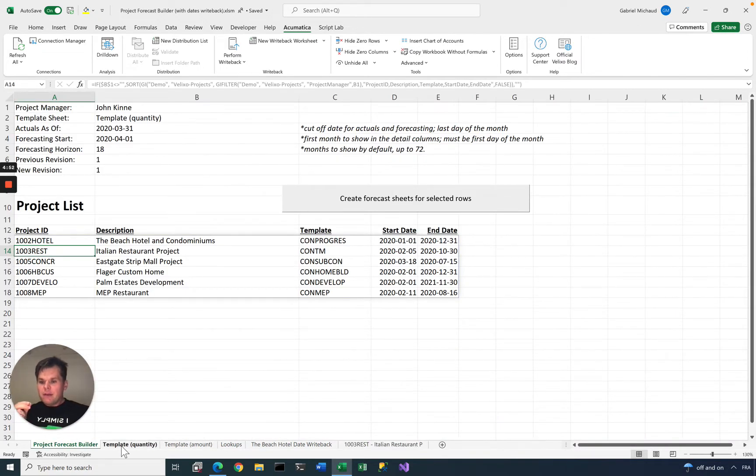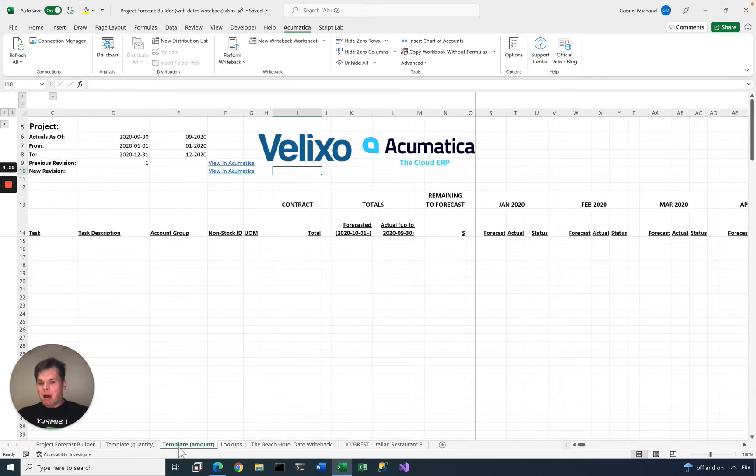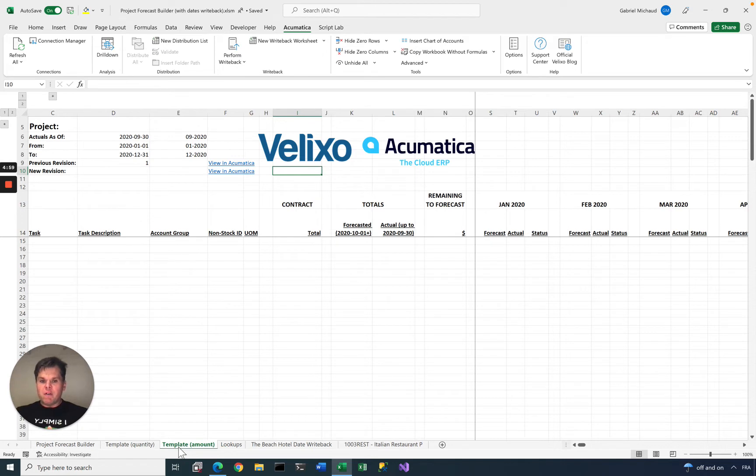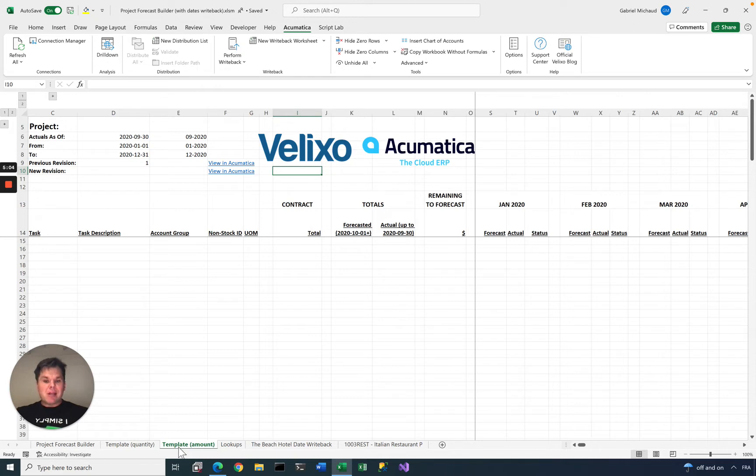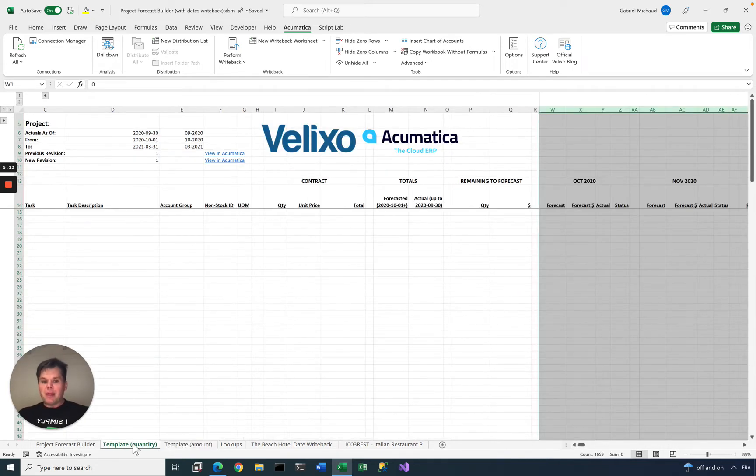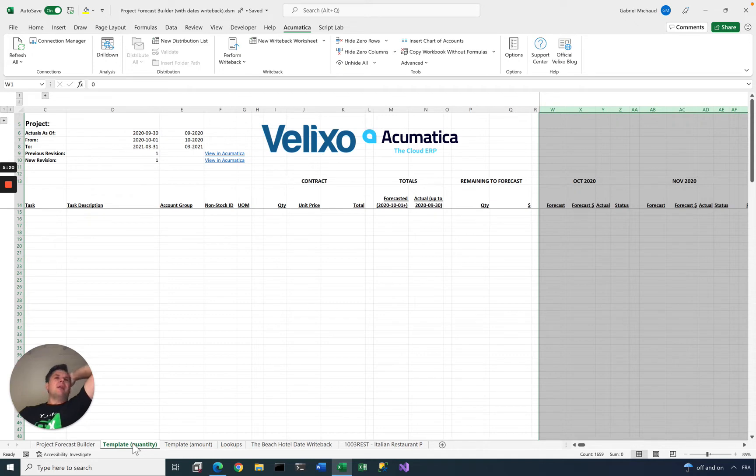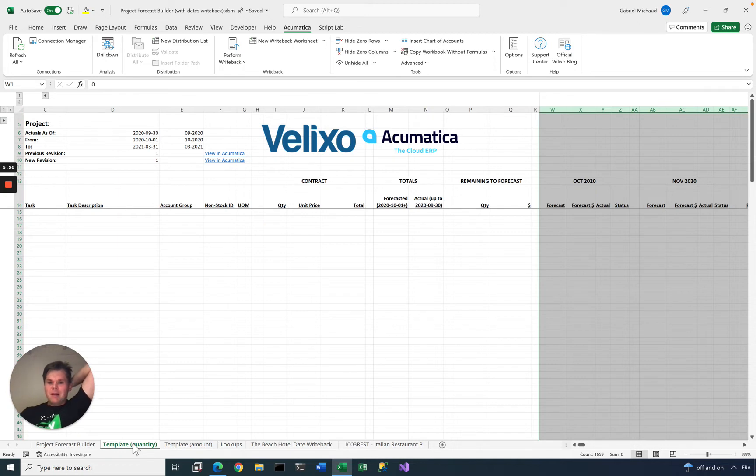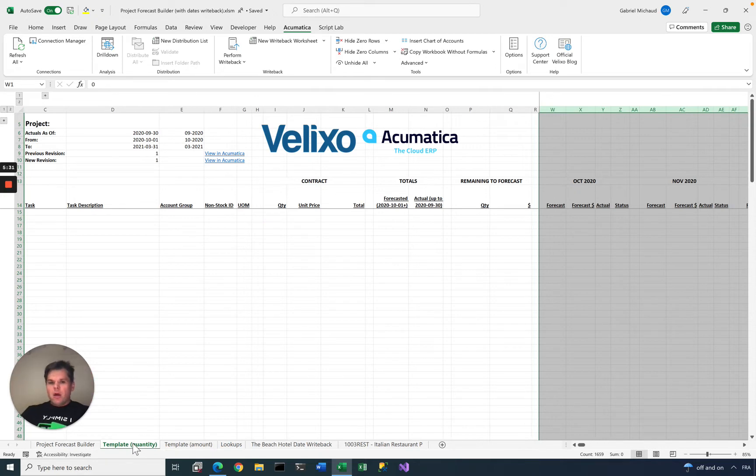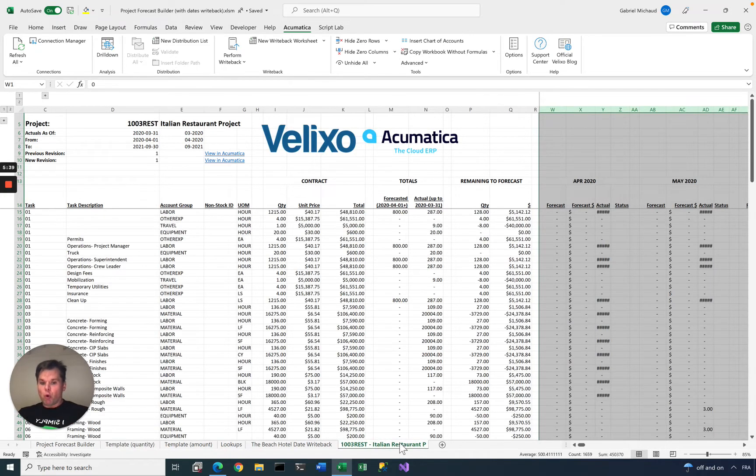One forecast is done by quantity, and the other one by amount. We did that to meet one of our customer requirements, but also to illustrate that you can do forecasting differently based on the project. If you are planting trees and you just need to forecast the number of trees that you will be planting, a simple template by quantity makes sense. Nobody is going to say they're going to just plant $6,534 worth of trees, they're just going to plant 675 trees next month. If you're forecasting machinery, you might be calculating in dollars. So you have this flexibility, and that's how we set up this particular workbook.